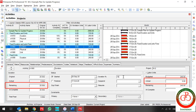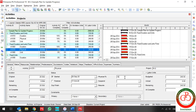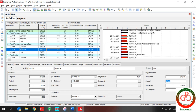If I select Duration type for progress registration and put 10% progress, everything updates. For Physical, like the previous example, if I only enter 10% nothing changes, but if I enter 24 I can register my actual progress. If I also register remaining duration as 19 days, my actual decreases.